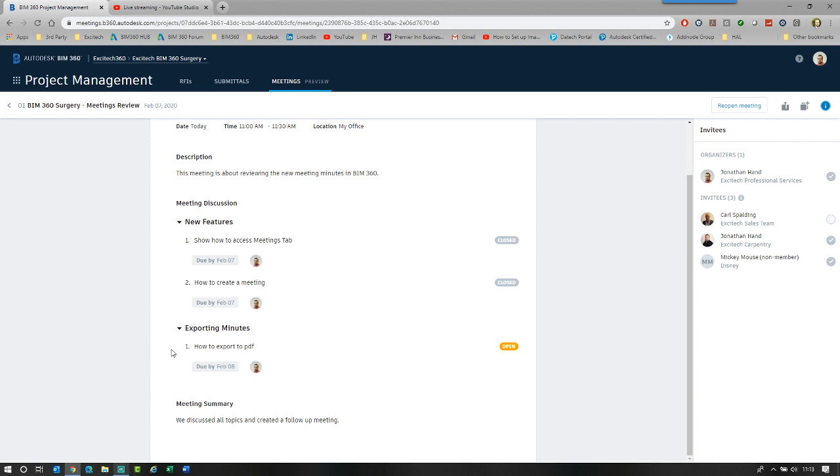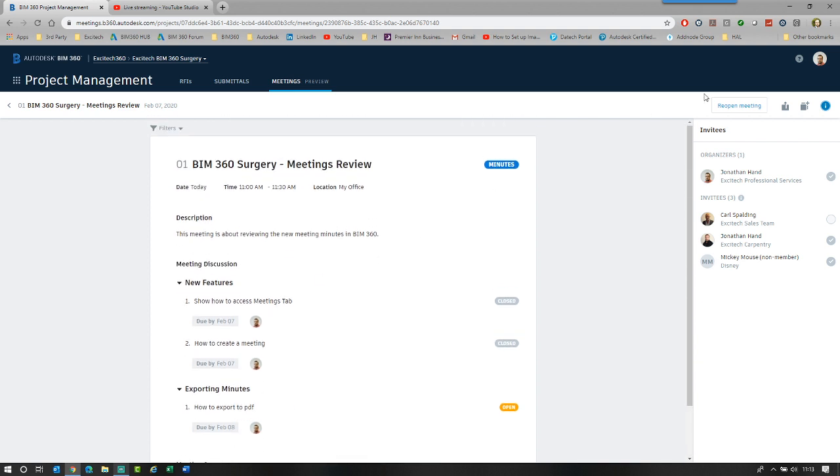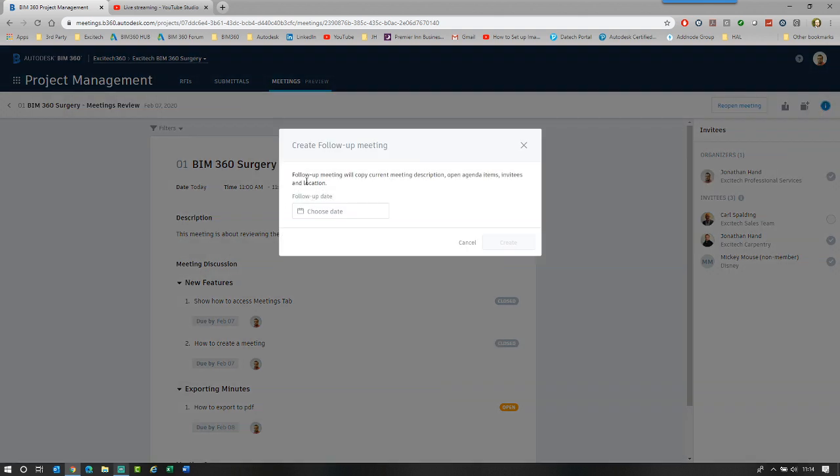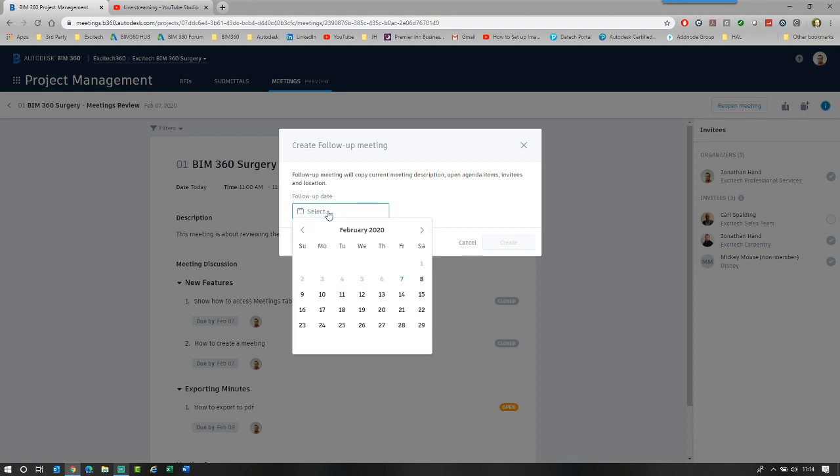But we still have this outstanding item and what I want to do is create a follow-up meeting. So you'll see up the top, you've got an export button and then a follow-up meeting. What happens with a follow-up, it takes all the open tasks outstanding and moves them automatically into the agenda for the next meeting. So you can see the minutes are here, there's two closed. As soon as I go follow-up meeting, we'll copy current meeting description, the open agenda items, the invitees and the location. So I'm going to say, okay, let's have this meeting tomorrow and I click create.